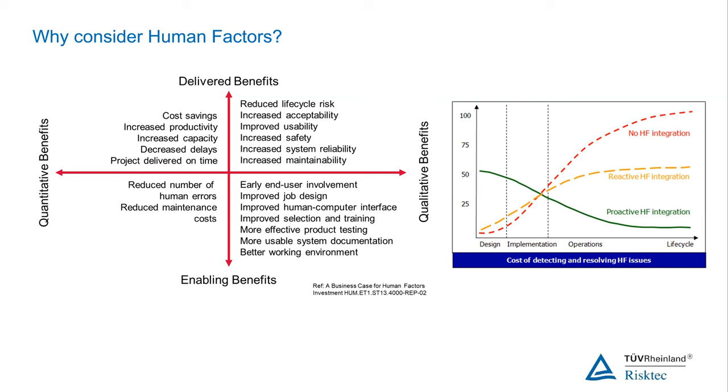If you don't address them and you go through to operations and then you find the issues, the cost of addressing those at that time is a lot higher. And there's probably not much you could do about the design then. So you're probably looking at what can we do about training and procedures to try and mitigate any errors. So you really want to try and look at your HFE as early as you can.